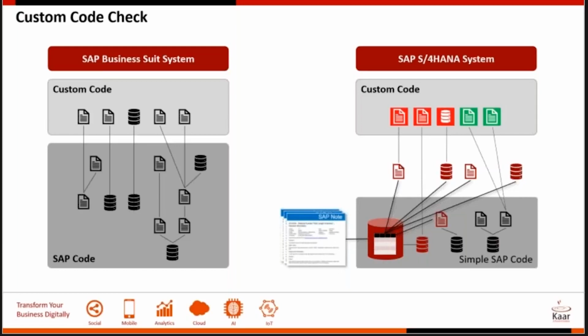From our learning experience earlier, we've realized that you should monitor your business processes for a longer period of time, and it should be on production. You'll have to turn on some logs, some key switches, so you start tracking them. If you're not tracking them, you're not going to know what is being used. And typically, if you can do this for at least a 3-month period, it really gives you the right statistics. It helps you clean up the custom code a lot better.